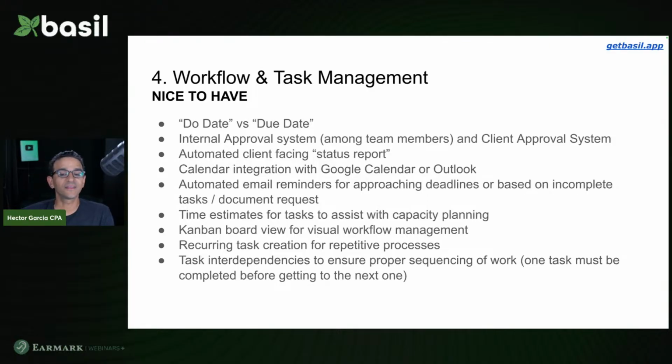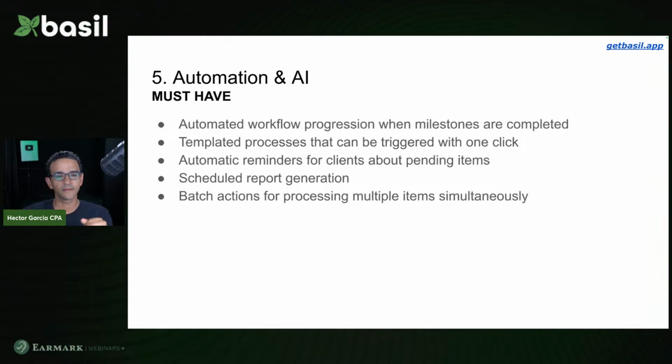And then task interdependency. So you cannot get one task checked off until the task above it is checked off. That's to avoid errors of people skipping things, or forcing the user to say, yes, this was completed before I can check something under it as completed.